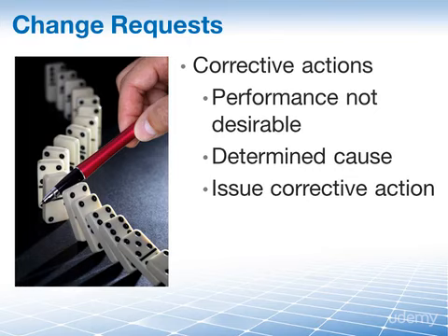Maybe we noticed that our project status reports that we send out on a weekly basis are way too frequent, and we need to send it out only once every 2 weeks so that people actually will read them every 2 weeks. That could be a corrective action when it comes to communication.